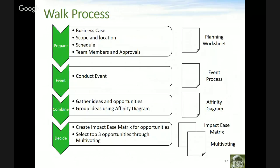And then is there a larger plan to go to other areas and departments? And then we'll have a final review, get all the team members together and say, this is the plan. This is what we're trying to accomplish. Does everybody buy in? Are there concerns? Can you make the dates? Are you available? And if so, then we close out this planning worksheet, sometimes called a charter form,